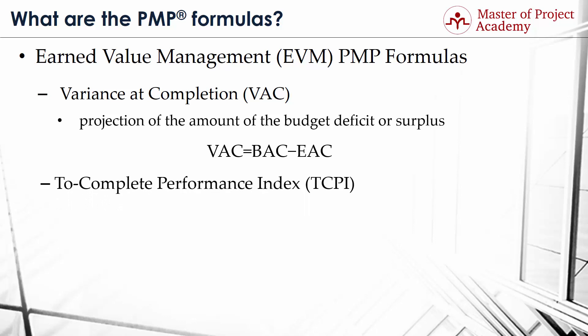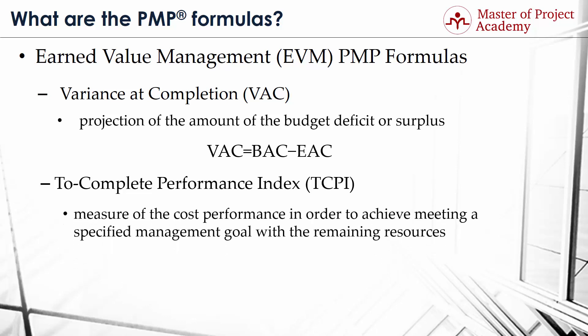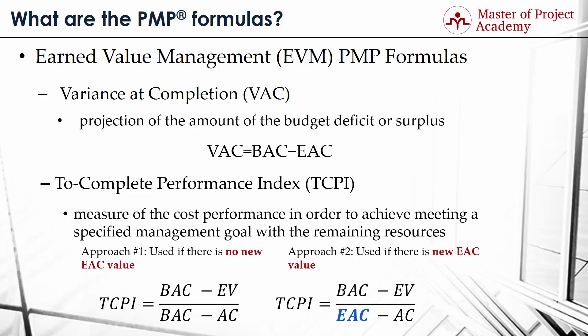PMP formula number 11: To Complete Performance Index or TCPI. TCPI is a measure of the cost performance required to achieve a specified management goal with the remaining resources. It represents the ratio of the cost to finish the outstanding work to the budget available. There are two approaches: Approach 1, used when there isn't a new EAC value: TCPI equals the result of BAC minus EV, divided by the result of BAC minus AC. Approach 2, used when there is an EAC value: TCPI equals the result of BAC minus EV, divided by the result of EAC minus AC.